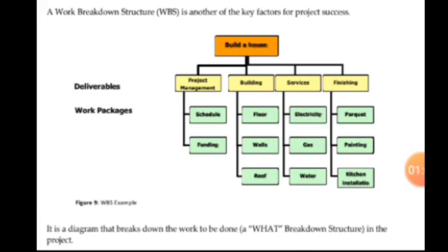Now, in any project, the first deliverable should always be the project management. Regardless of the kind of project, your first deliverable should be your what? The project management. Now, the work packages under project management should be the schedule and the funding. It means that schedule and funding are activities that the management will carry out. They are going to determine the time as well as the funding of the project.